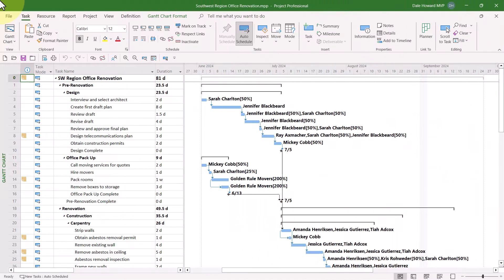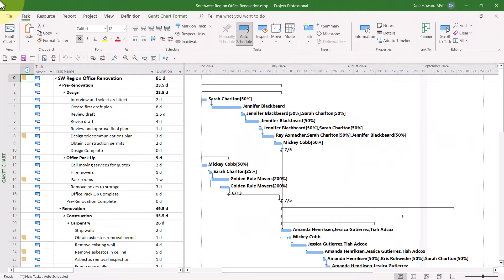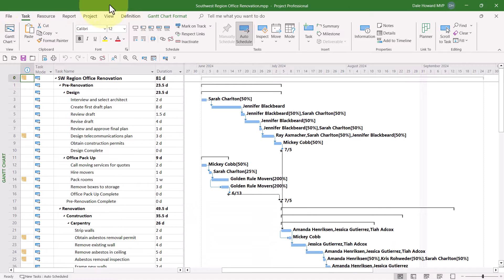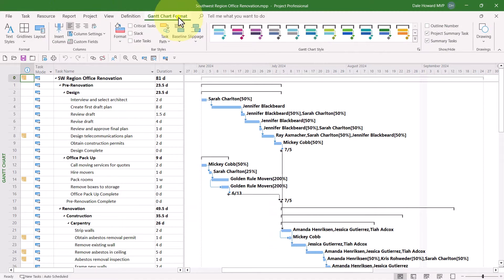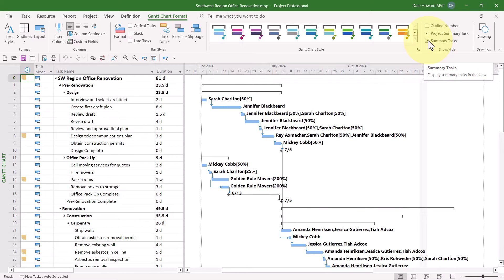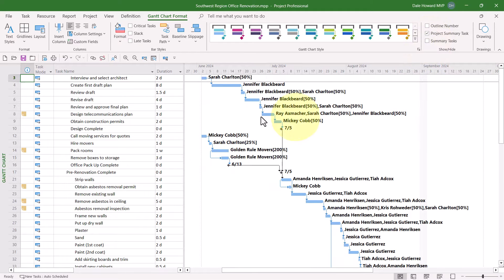So let's get started. If you should ever want to hide the summary tasks in your project and only display detailed tasks and milestones, then do the following: click the Gantt Chart Format ribbon tab to display this ribbon. Then, at the far right end of the ribbon in the show-hide section, deselect the checkbox called Summary Tasks.